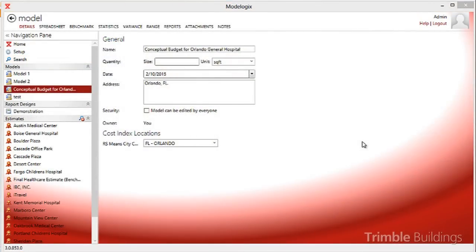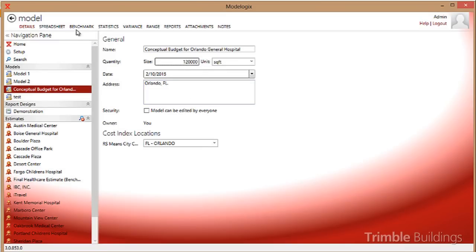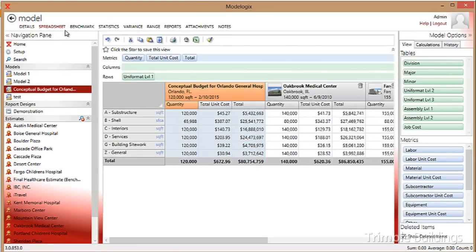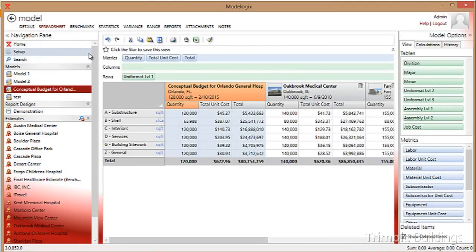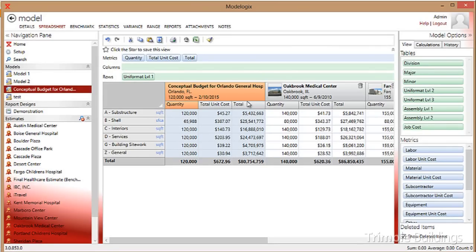After selecting the three projects, you can now enter some minimum scope for the conceptual budget that you're creating a cost model for. For example, I will create a cost model for a proposed hospital in Orlando, Florida. I'll enter 120,000 square feet for the project, potentially a start date or a midway point in the project, and then I will let Modelogix take care of all the math for me. Here you can see how quickly Modelogix assembled the model and has done it in a matter of seconds, something that would take me hours if not days if I had to perform this task manually. In the first set of columns, I see the model itself for the conceptual budget for the Orlando General Hospital.